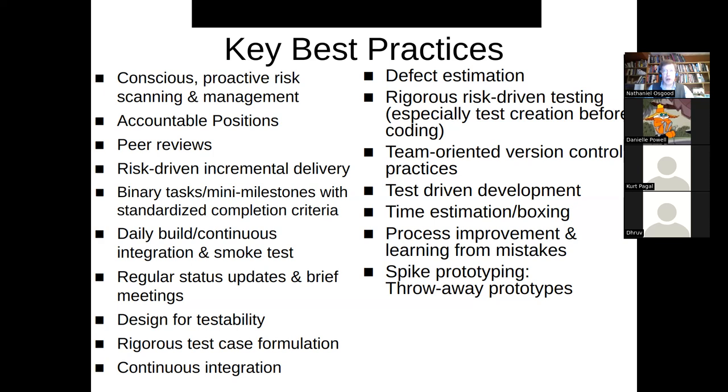These are things you're not going to run a test on, as much as I love tests. You folks know I love tests, but tests are not the end all, right? You can do peer reviews on these, and it's hard to imagine any test being more important than peer review of a requirements document. If a requirements document has issues, ain't no test going to reveal those issues. You're not going to be running JUnit on your requirements document, but through inspections you might bring up these issues and then clarify them with the stakeholder. So absolutely key, right?